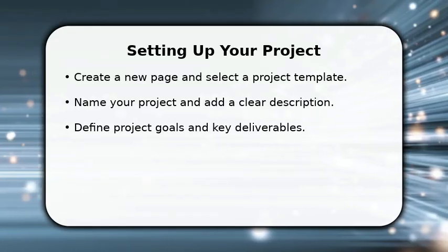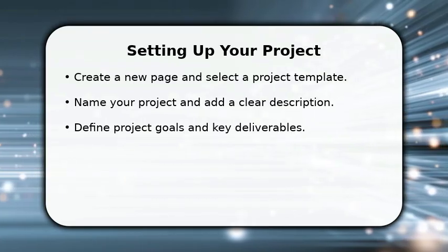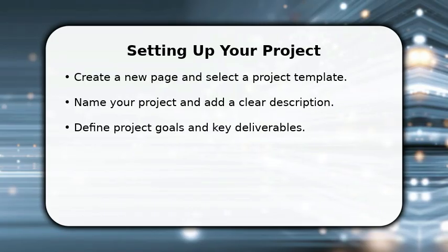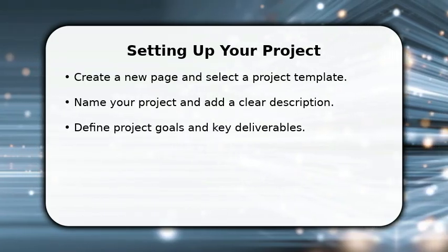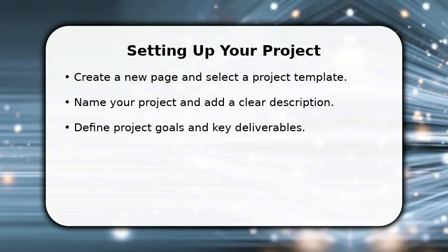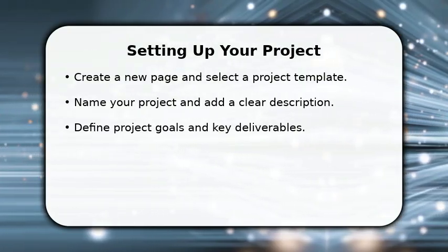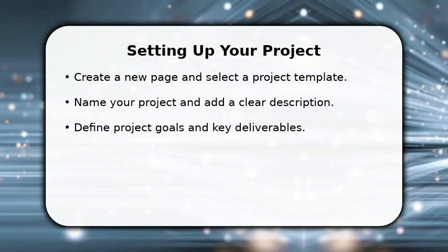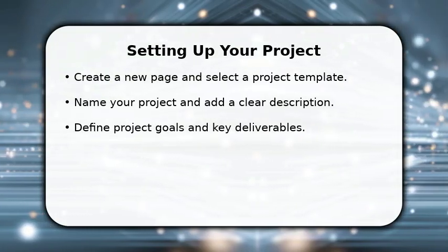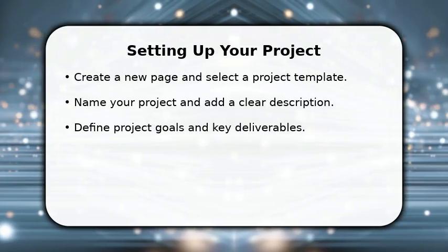In this video, I will explain how to use Notion for project management. First, open Notion and create a new page, then choose a project template to get started quickly. Give your project a clear, descriptive name and add a brief overview. Next, outline your main project goals and identify the key deliverables you aim to achieve. This initial setup is crucial for a well-organized project.